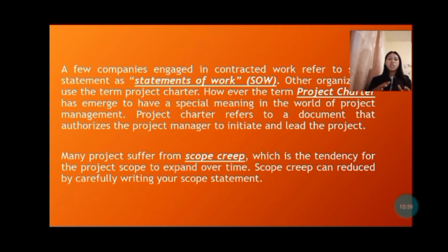Changes in requirements, specifications, and priorities frequently result in cost overruns and delays. For example, when requested deliverables become many more deliverables, or when the customer needs to change the requirements. Another example is when the end goal for the project is changed by the stakeholder. So that is a scope creep example.